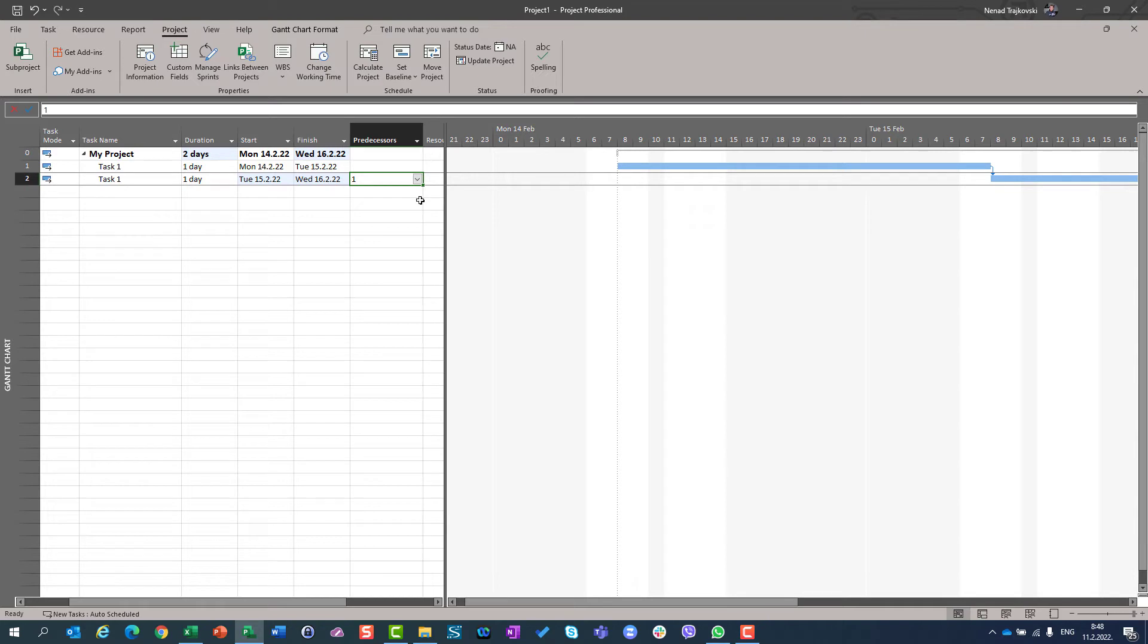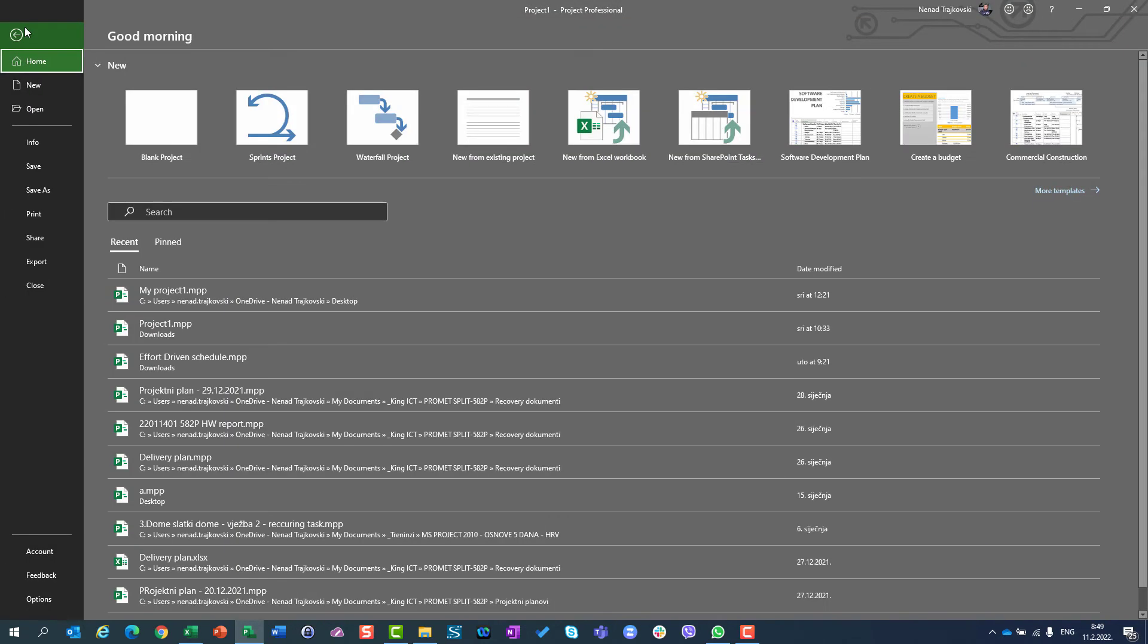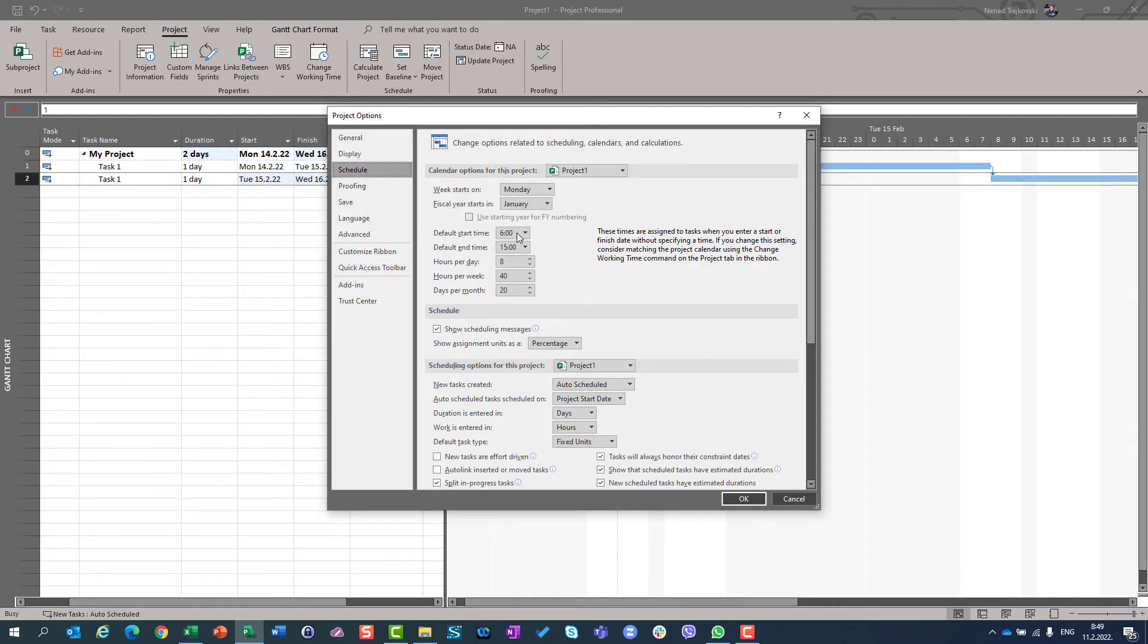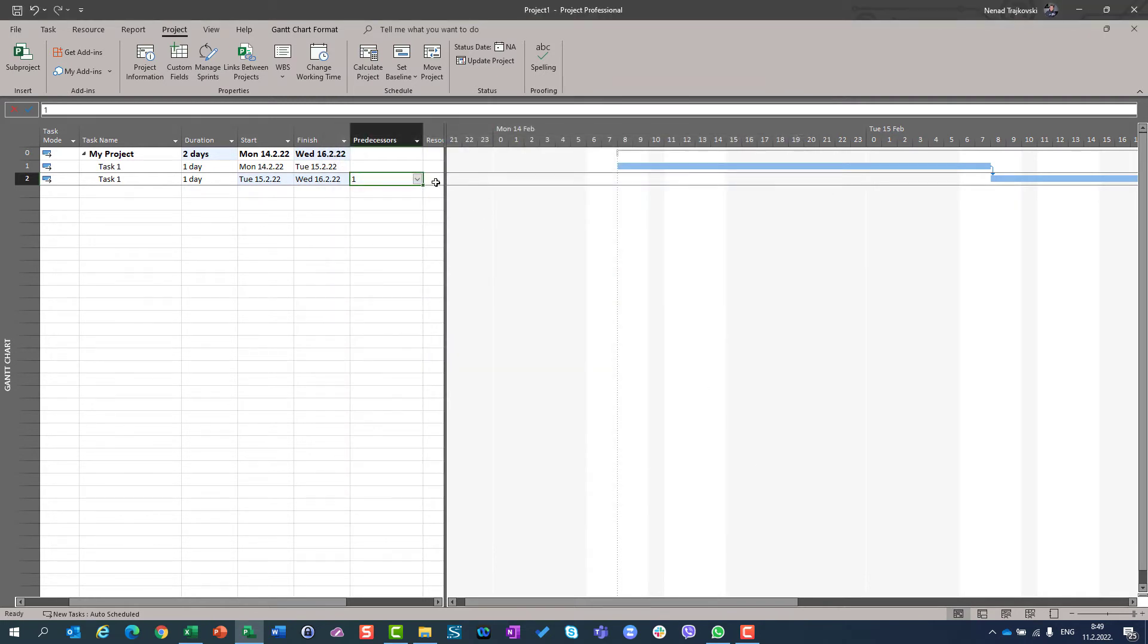Why? Because this is the discrepancy. Ok. It should start at 6, but it didn't. Why is that? That is because if you set your working time and your schedule here before 8am, no matter what you put here, 6am, 5am, 7am, the first task will always start at 8 o'clock in the morning.